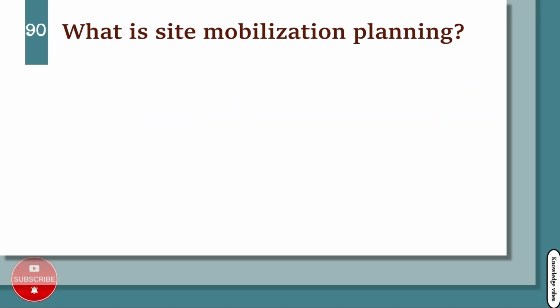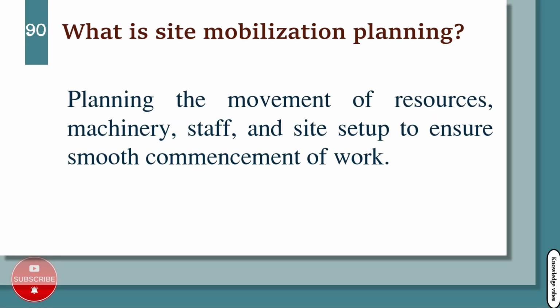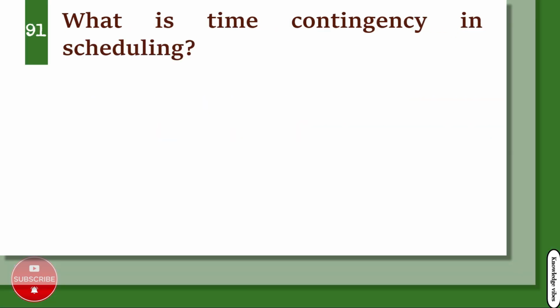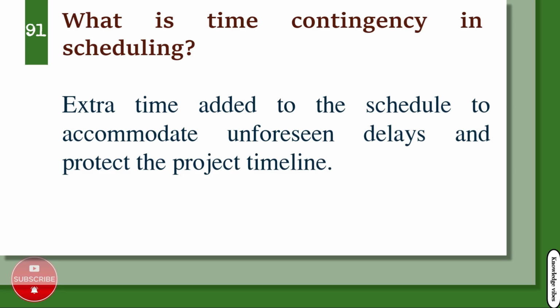What is site mobilization planning? Planning the movement of resources, machinery, staff, and site setup to ensure smooth commencement of work. What is time contingency in scheduling? Extra time added to the schedule to accommodate unforeseen delays and protect the project timeline.